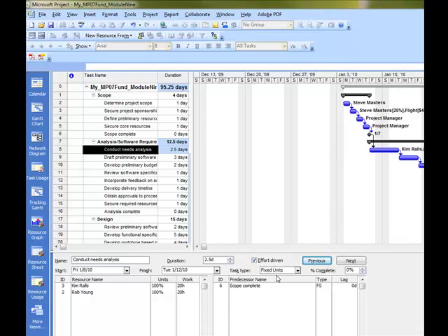It was fixed units effort driven, so the units remain fixed, but the duration reduced to 2.5 days, and the work was also reduced, because the work is only going to be conducted over a 2.5 day period, right? So just do the math there. 8 hours plus 4 hours is giving us the 20 hours for each resource over 2.5 days, because our units were fixed. And that was a secondary assignment. And notice, of course, it affected the schedule.